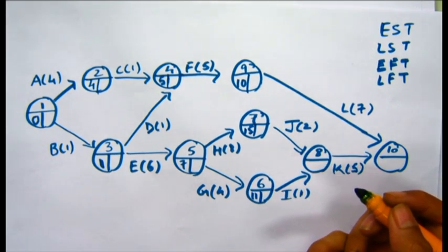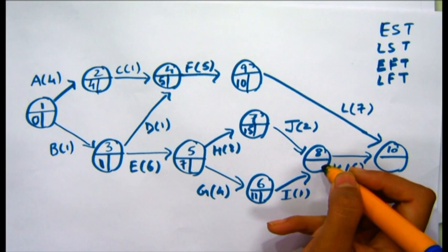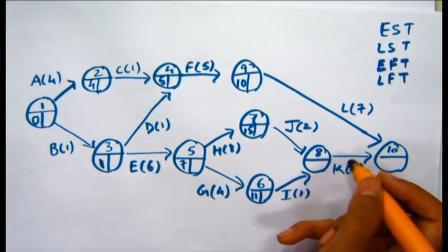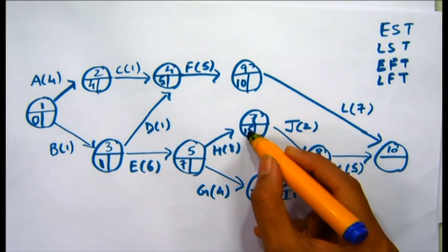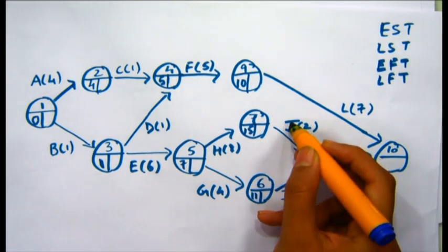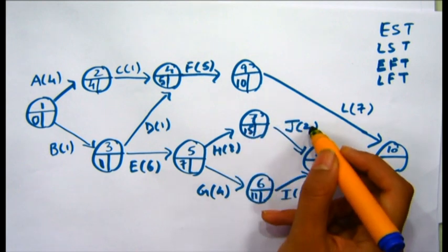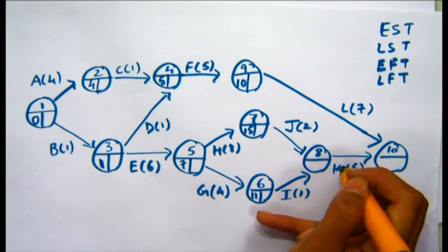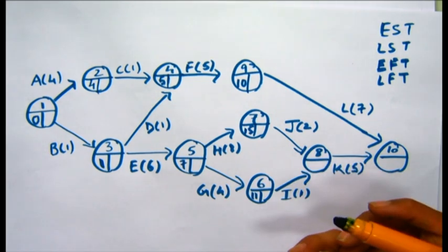If you remember, it was given in the details that when we have 2 activities preceding one single activity, we take the highest time. If we add the duration of activity J to its earliest start time, which is 15, we see that we can have 17 here, which means that activity K's earliest start time would be 17 days.